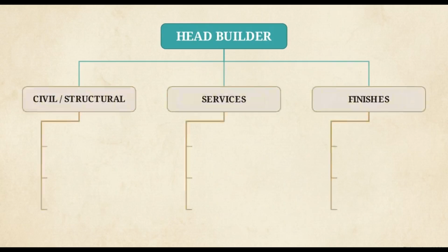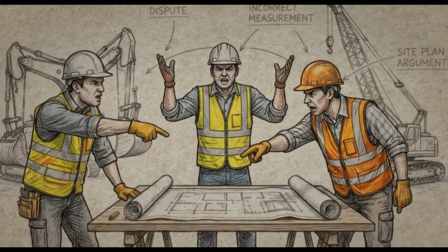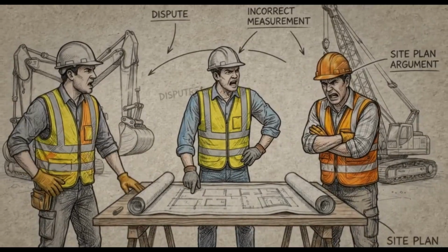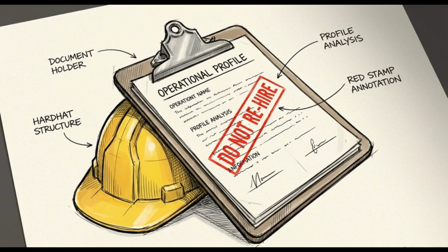The final step is documenting a formal subcontractor structure. This establishes reporting lines that give lead trades authority over the trades that follow them in the build sequence. Failing to define these scopes and authority lines at the start leads to inaccurate pricing and site confusion once the work begins. Stage 2 is about due diligence.